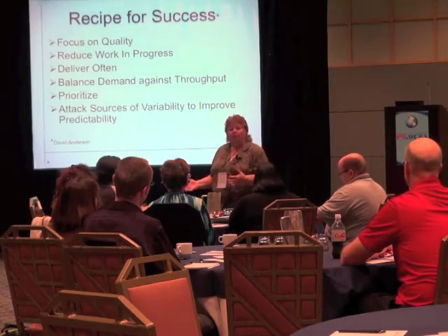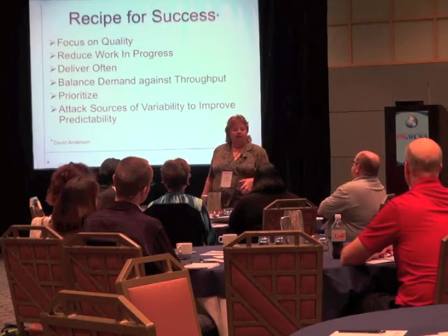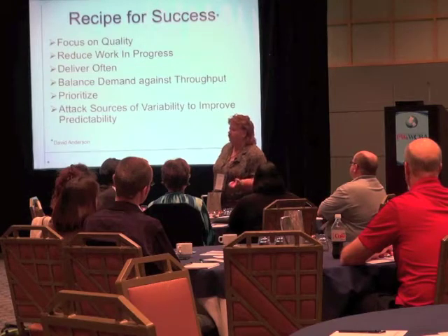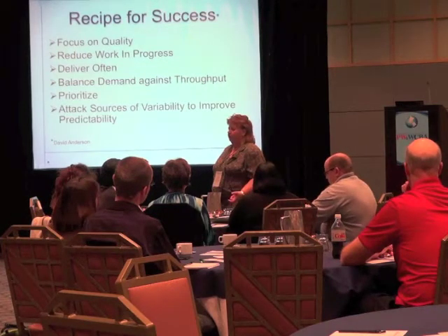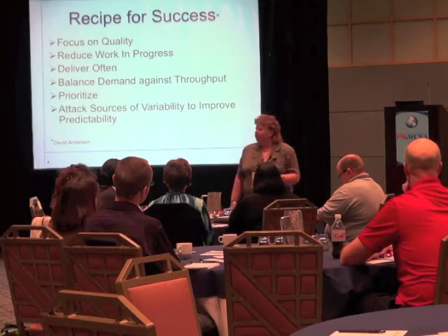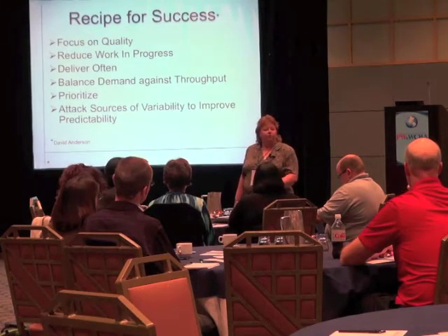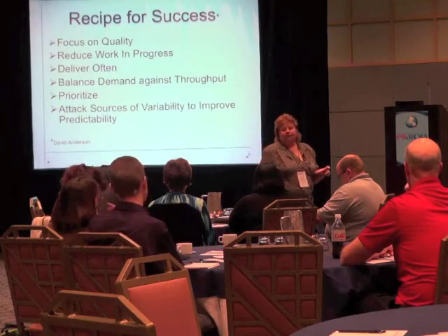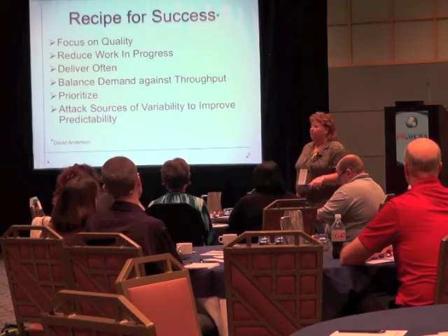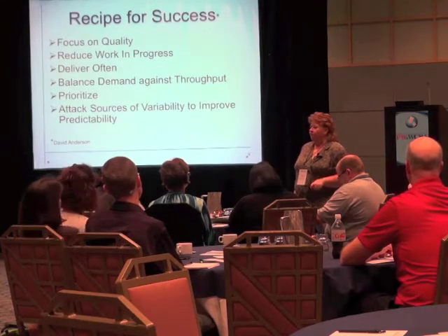So again, this is part of knowing what your space is and deciding what's the right answer for you. If you needed to know the difference in the small, the medium, and the largest, one of the ways to do that is to create different classes of service. Another way to do that is to try to make everything a similar size. When I say similar, I don't mean it's the same size. So I'm not saying turn everything into a 4-hour task.